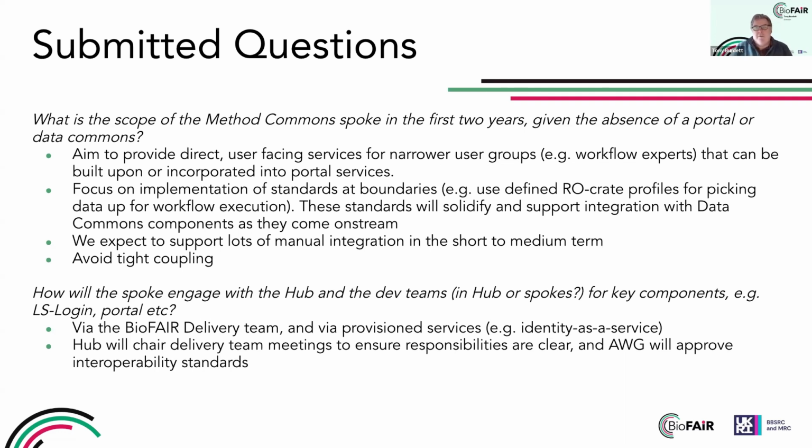You'd like to be able to integrate the Methods Commons with the data commons, so data sets are pulled straight out in very standardized ways, but you could imagine working with one particular domain or one particular Pathfinder project that already has their data quite well formatted in one particular repository that adopts the standards that the Methods Commons would want. So thinking about narrowing a little bit to demonstrate value early, and then backloading some of the complexity of integrating with later services later into the proposal could work.